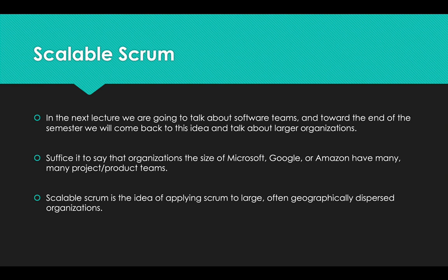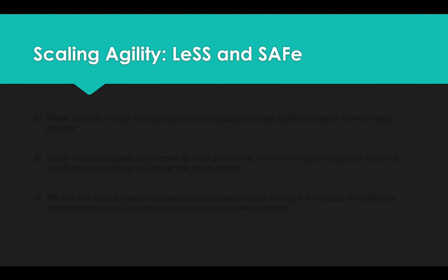You take the same sort of ideas of Scrum, but you kind of blow up the idea of a daily Scrum meeting into multiple Scrum meetings, and then meetings about those Scrum meetings that happen less frequently or asynchronously or over text communication through message boards, etc. It's basically generalizing Scrum to a much larger group of people.